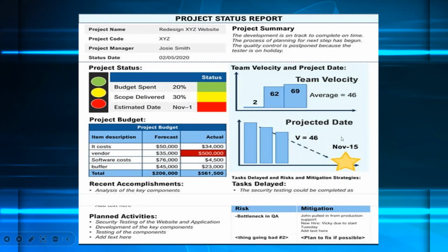And then it's looking at the projected date here of what needed to be done. Okay, so each bar would represent the sprint, and when looking at the timeline with that velocity, it is able to project a date when it will finish. So it's saying that if they continue this way, that particular phase or quarter will be completed November 15. And remember, the estimated date that they're expecting is what? 1st of November. So that's why your RAG status is red here, to say if we're looking at what the chart is telling us, that this is when we will complete, then we won't be able to meet that 1st of November.